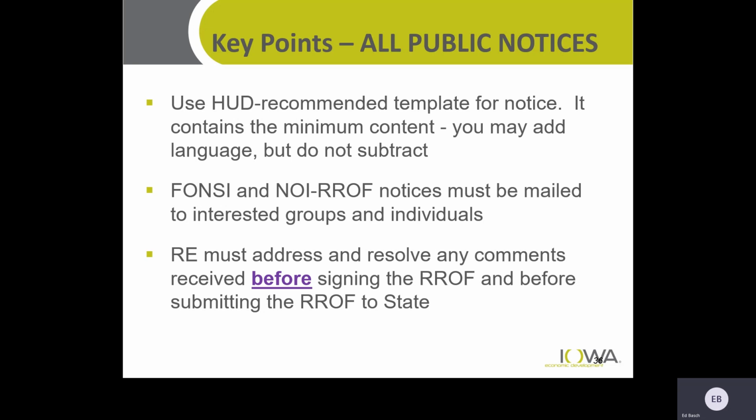So use the HUD template for your notice. It's on our website. It contains the minimum content you need. You can add language, but don't subtract from it, because everything that you see in the template is required. Finding of no significant impact and intent to request release of funds must be mailed to interested groups and individuals.